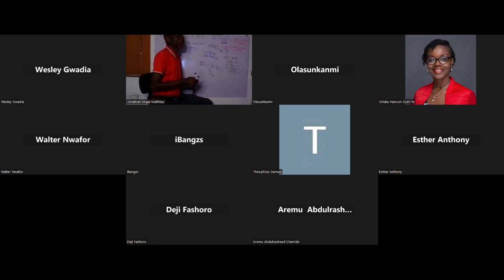Before I file my closure report, I will just try and do a percentage. This is about 20%. This is about, let's say, 25 or 30%. This is about 30. This is about another 20. So I have a rough estimate. If I have done it for one project, two projects, and the percentages are similar, and most times the percentages are similar.